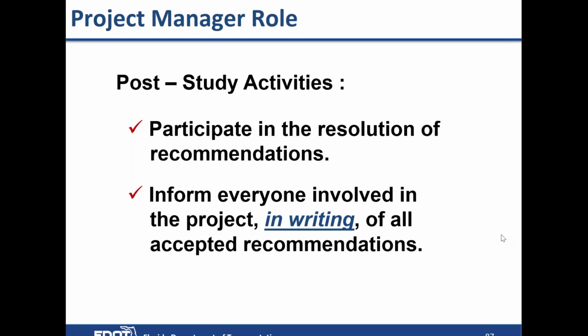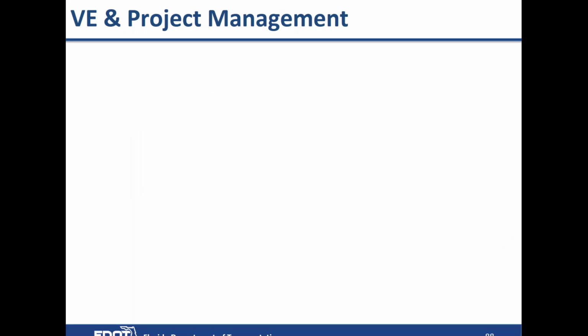Once decisions are made, the project manager needs to inform everyone on the project in writing of all the accepted recommendations so that they can move forward and be developed further. So, VE and project management.